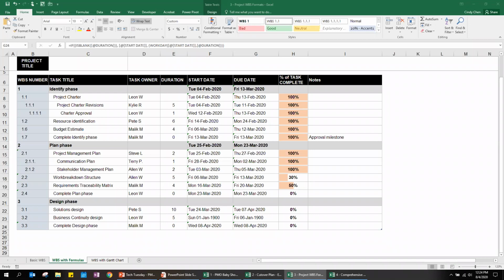Another question that just came in, when planning, what kinds of things do you consider when creating your columns? Oh, that's a good question. So I normally just do the task number, so we have something to refer to because rows can change, especially if you add a new row. Definitely the title, who's responsible, the duration with the start and end date, and then notes.